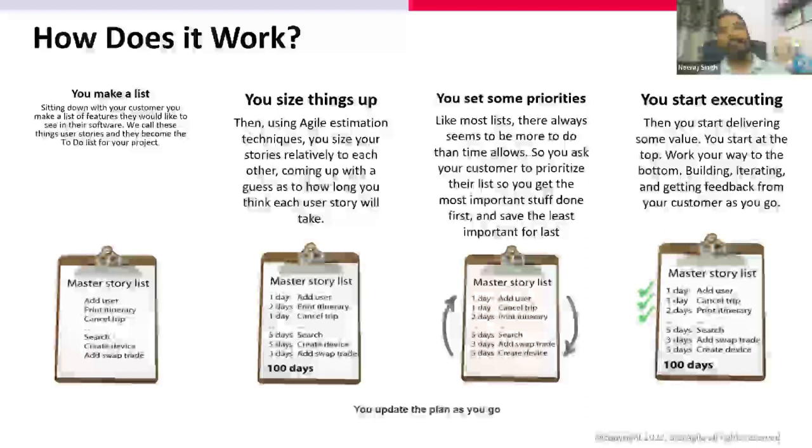Now, of course, you start with breaking up your bigger chunk of work into simpler works, and then you size them. Sizing is all about estimating them. We look forward at how much each of these work items would take to complete and achieve the goals right from the beginning. And sizing is where you are estimating the amount of work required to be done, which includes all your effort, the time, and the amount of work to be done on that particular item. At the same time, we look forward to prioritize.